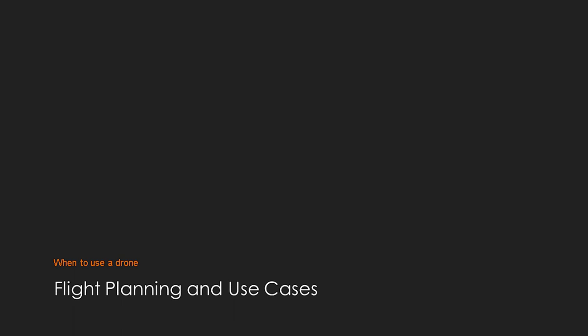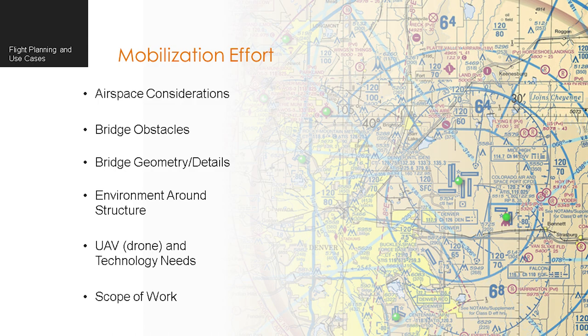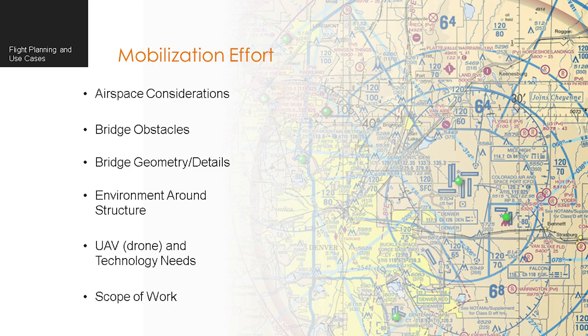So how are we mobilizing for these inspections? The first thing I always look for is airspace considerations — plotting that on the map and understanding where we're restricted from flying and where we might see obstacles because of other airports. Bridges themselves might also be an obstacle. Then we look at bridge geometry and where's the best use of these drones, the environment around the structure, and what UAV and technology we need to use.